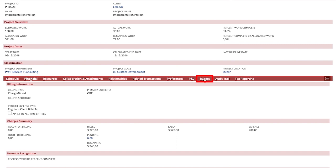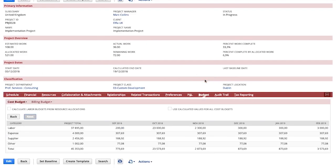A project budget can be managed manually by the project manager or updated automatically based on the information on the work breakdown structure.